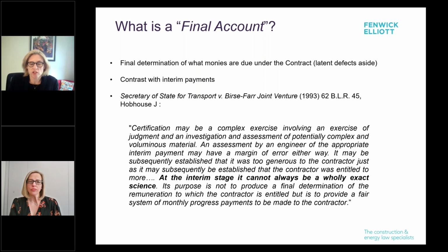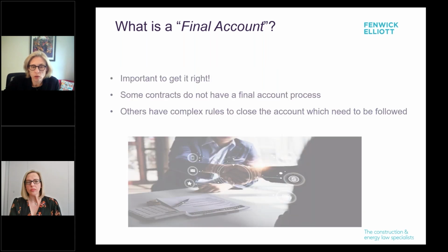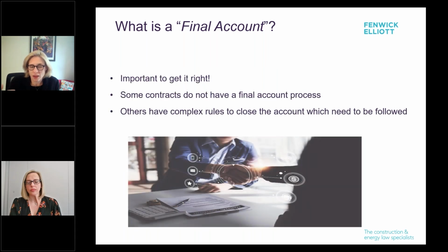At an interim stage, it's by definition interim. It doesn't have to be a wholly exact science. That's because the purpose of an interim payment is not to get a final determination of what you're entitled to. It's about providing fair, maybe rough and ready, progress payments to be made as you do the job. Contrast that to a final account. It's obviously very important to get that right.